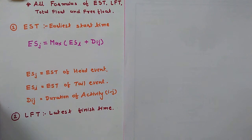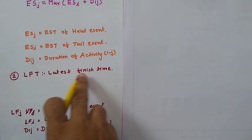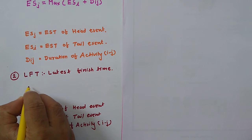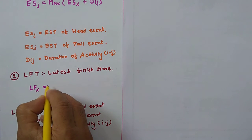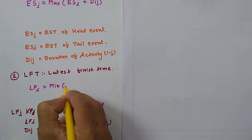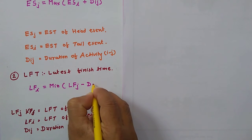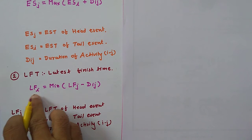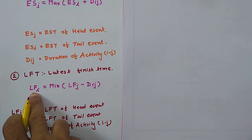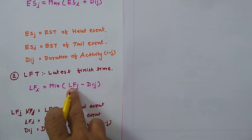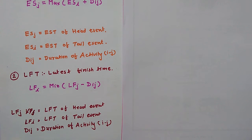The second formula is Latest Finish Time, LFT. Latest Finish Time is: LFI is equal to the minimum of LFJ minus DIJ. Here LFI is the latest finish time of the tail event, LFJ is the latest finish time of the head event, and DIJ is the duration of that activity.